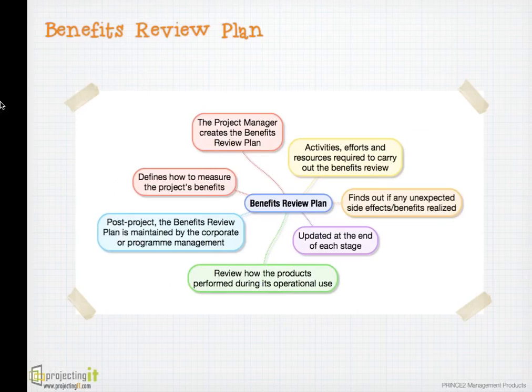This plan helps the organization in confirming the project benefits. So post project, when the project management team is disbanded, this plan is used by the operations or corporate teams to see whether the project actually achieved those benefits projected in the business case.